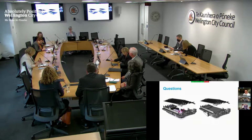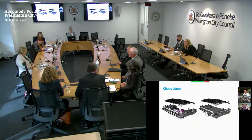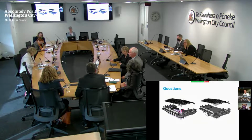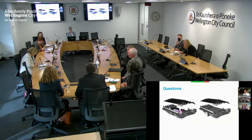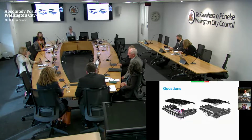Thank you. The second one is, we talked with the library about early contractor involvement. Would early contractor involvement have helped, and if so, to what degree with this kind of project, where it's a bit more of a voyage of discovery than the library was? Yeah, we got contractor involvement early on this project in terms of programming and also understanding of the building. We decided to run down the detailed design process and get it right through to full design information before going to tender. And I think that worked really well.